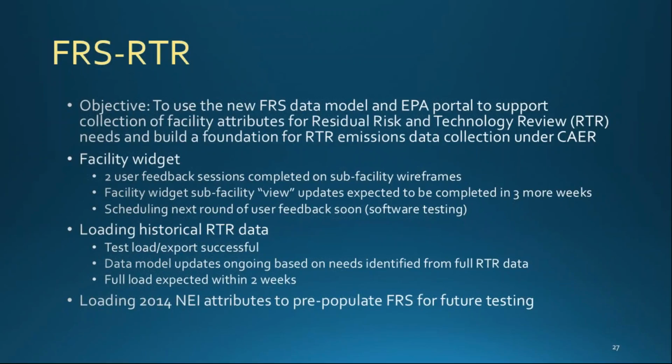We have had 2 user feedback sessions that we have used to inform the next steps. And the facility widget views for the sub-facility information are expected to be completed in about 3 more weeks. And then within those 3 weeks, we will be scheduling our next round of user feedback from our user feedback input forum groups. And then that will also be able to include software testing where the software has been implemented.